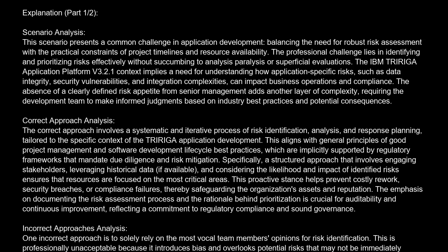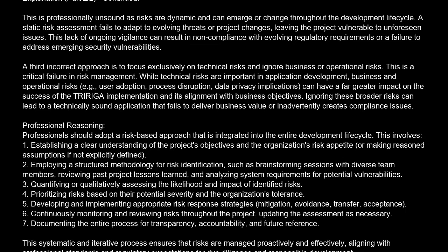It fails to meet the due diligence expected in risk management, potentially leading to the omission of critical threats that could have significant regulatory or business implications. Another incorrect approach is to conduct a one-time, superficial risk assessment at the beginning of the project and then disregard it. This is professionally unsound, as risks are dynamic and can emerge or change throughout the development lifecycle.